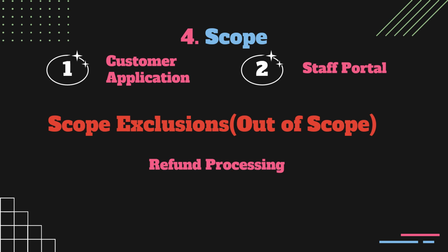Section 4 Scope. Outlining the project scope is crucial. You can avoid scope creep in the future by specifying this. The scope of our case study would require the delivery of application functionality connected to 2 crucial things. Customers can browse the menu items, order food online, and pay utilizing a service-oriented application. A staff portal is available for controlling orders received and their delivery on the staff side.